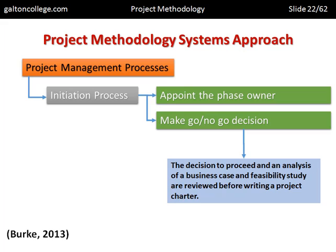There should also be a make go/no-go decision. The decision to proceed and an analysis of a business case and feasibility study are reviewed before writing a project charter. There's no point having a project if there's indecision about whether it's desirable or if it's objected to by various levels of management. A decision has to be made: go or no-go — start the project or don't. If no-go, stop it early so that resources are not wasted.